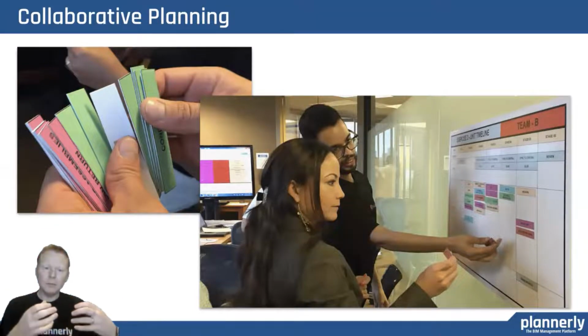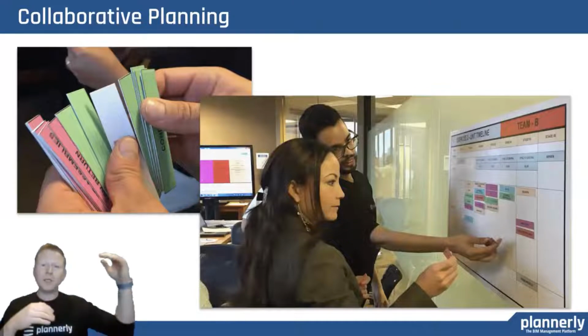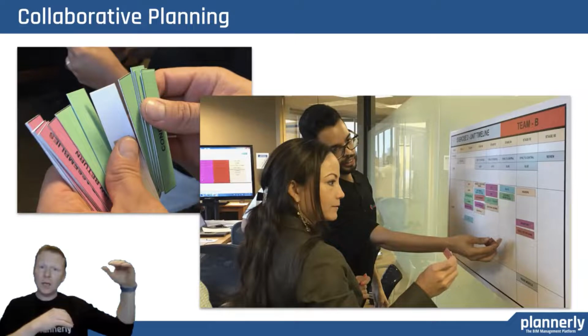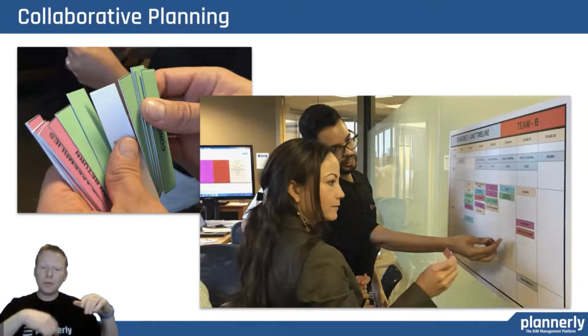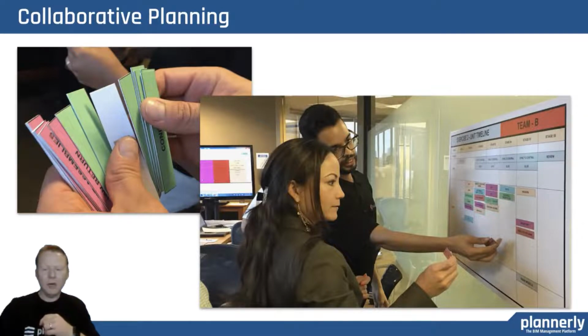Instead of taking what they know their scope is and going off and starting, they had conversations with each other. And they said, well, I'm not going to start even modeling my lights until you've set the ceilings, because I know that I want to put my lights in that place. Or, well, we need to know the lights for the layout. So the architect early on maybe has to put just a symbol representing where that is going to be, because obviously there's an impact on other things. So there's a series of conversations that occur that don't naturally occur inside of our traditional phase-based approach.